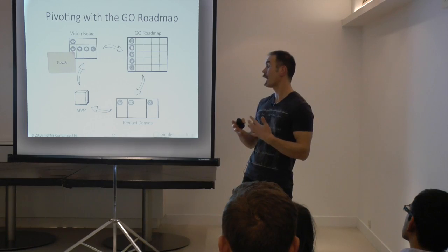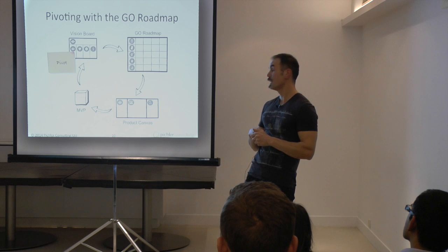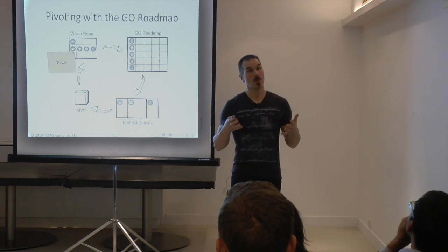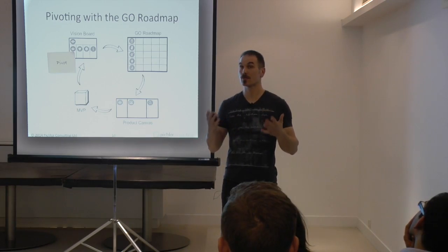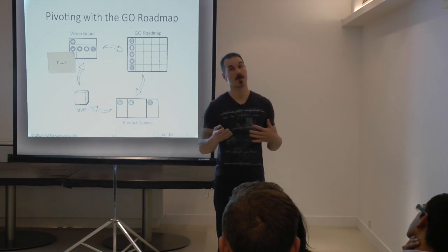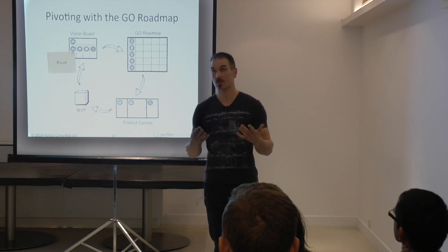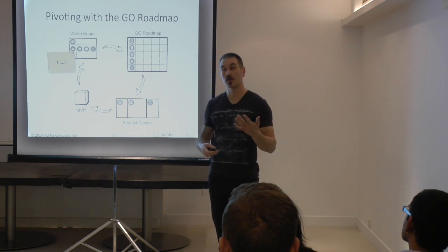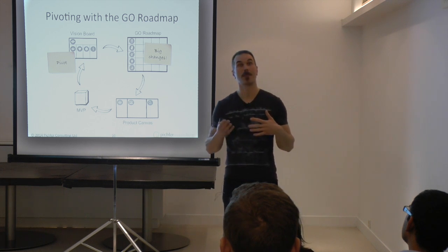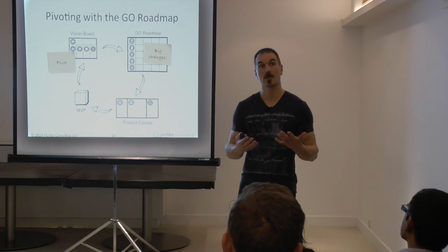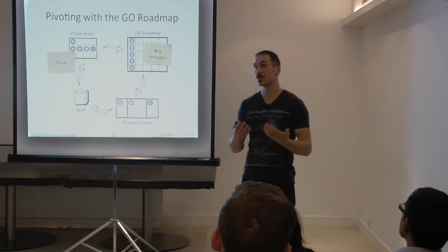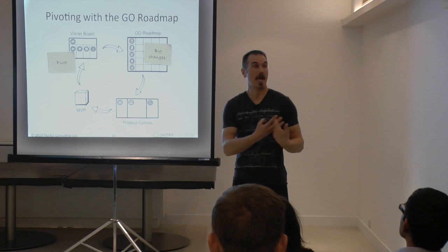We've got to change the path to achieve our vision, and we've got to change the way we build the product. Now, whenever you work with a product roadmap and you're in that position, and that's really something when you build a brand new product and you use Lean and Agile practices, there's a strong likelihood that you will have to pivot at one point or the other. So if you use a product roadmap, then that means that not only your business model or your product vision board has to change because of that change in strategy, but also your product roadmap has to undergo some significant changes, some big changes. You may even have to throw it away and create a brand new roadmap, right? Depending on how big the change is.